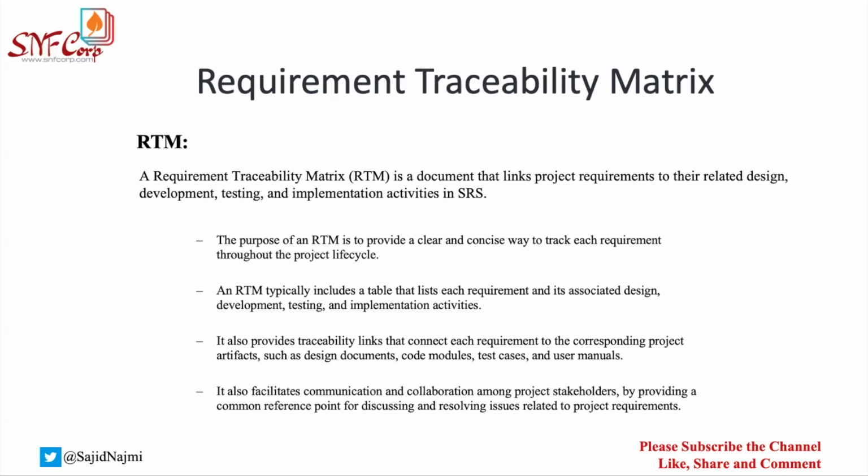You would only make this RTM if a lot of changes are coming and there are a lot of things that you have to track here and there. Then you would want to create an RTM, not for simple one-liner or one-text changes, or something that can be handled very quickly. That would be additional effort, and you don't want to put additional effort into those small changes. In the case of a bigger, larger project, you can use it.